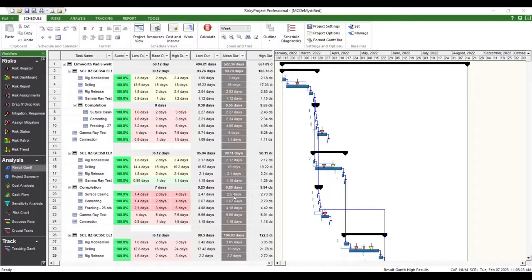And let's say that high impact has a distribution curve to it. So it's low impact, high impact, but you really have to think about it. If I have one or two things, you might want to put that up to maybe 2,000, so it occurs 40 times during a simulation, or maybe even higher than that. But you just want to make sure that you account for those risks occurring, to get the full impact.